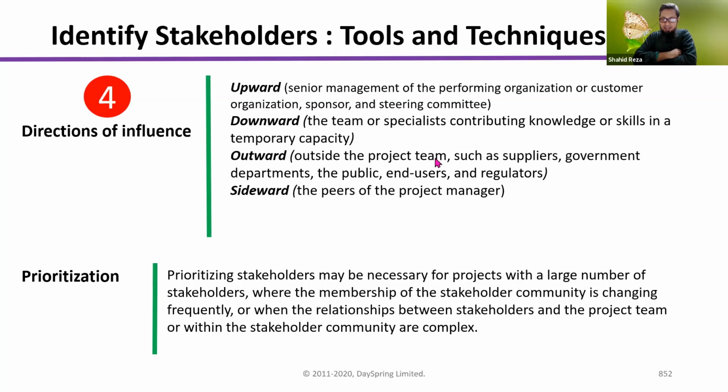One very critical thing: all the information you capture in a stakeholder register cannot be shared with everyone, right? Maybe you are saying a stakeholder is dormant, and that information should not be seen by the stakeholder. There will be a lot of information related to stakeholder engagement that you should not place in a shared document where everyone can see, because that will create another problem. Even in PMBOK, if you read thoroughly, you will see a line or two saying that information about stakeholder engagement should not be in the shared document. In some other places, we put that information.